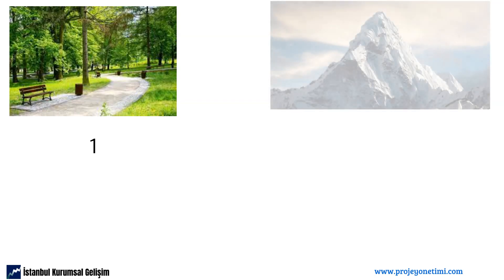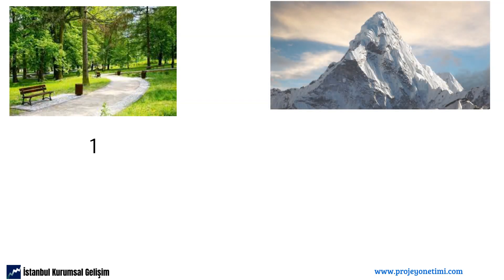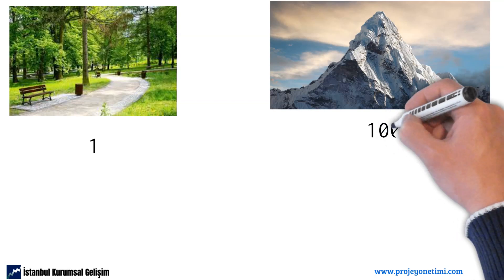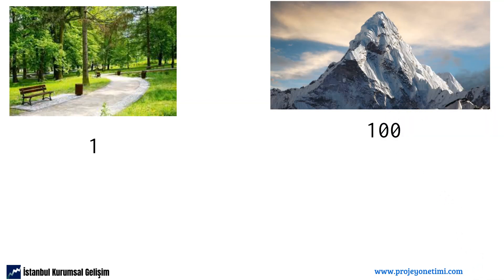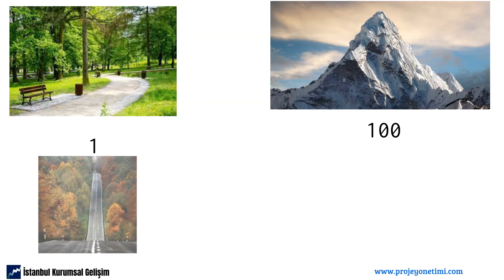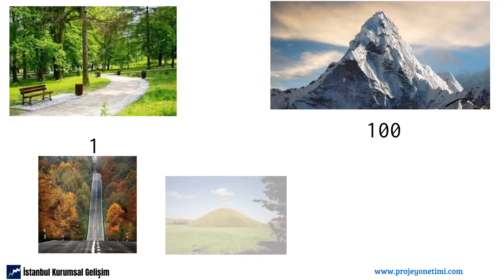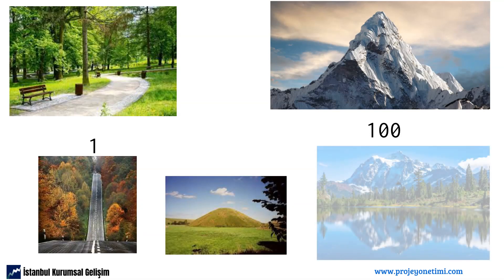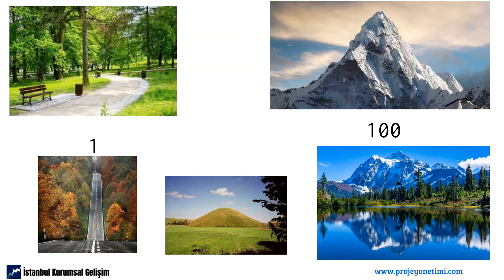Another similar point of view could be as follows. For example, let a walk in the park be represented by just the number 1 in terms of effort. In contrast, the difficulty and complexity of climbing a mountain like Everest is represented by the number 100. Thus, we have determined the criteria that we will use as a scale. After that, we can estimate the magnitude of our work by thinking about walking in the park, climbing a slope or a small hill, climbing a mountain near our city, and finally reaching the summit of Everest.